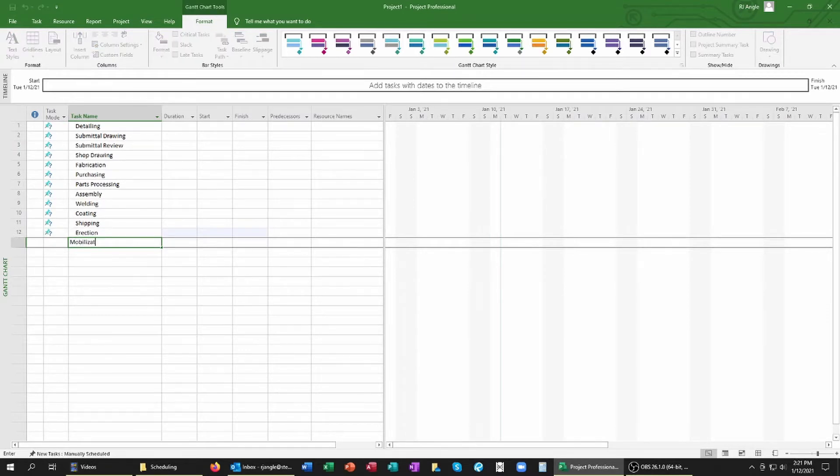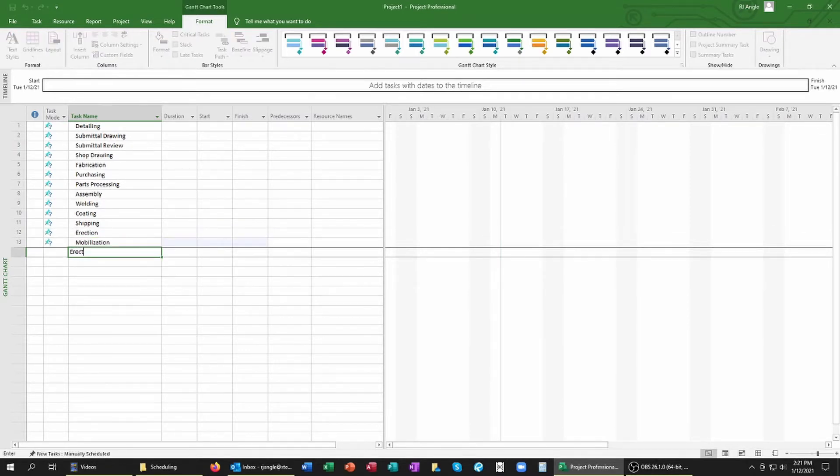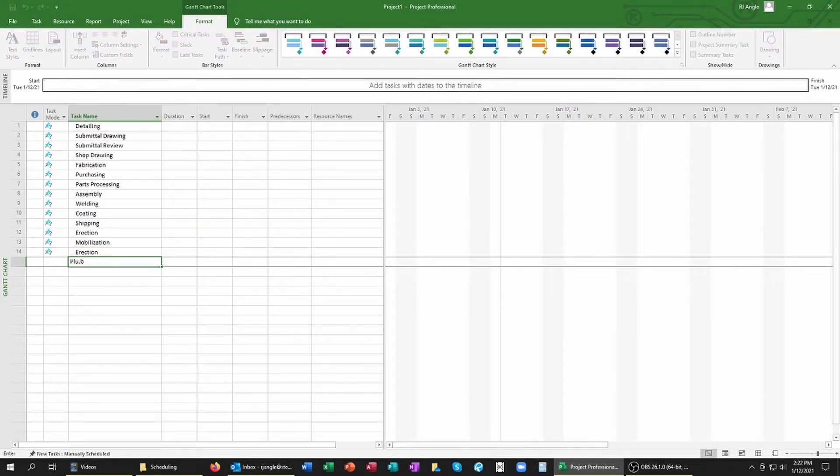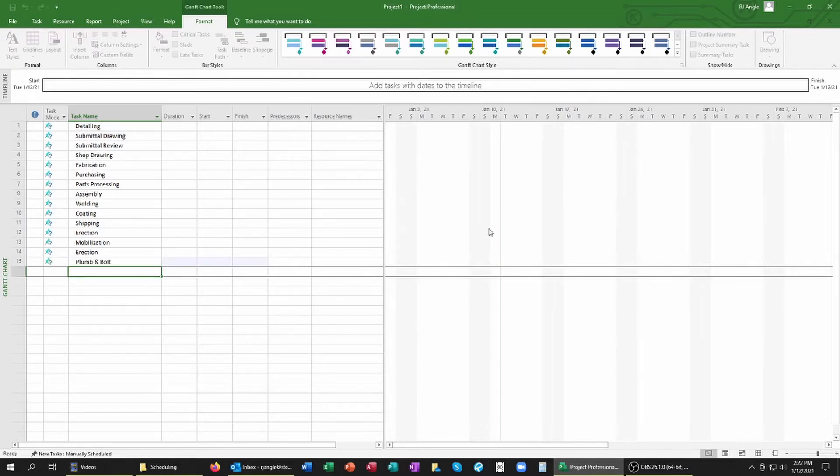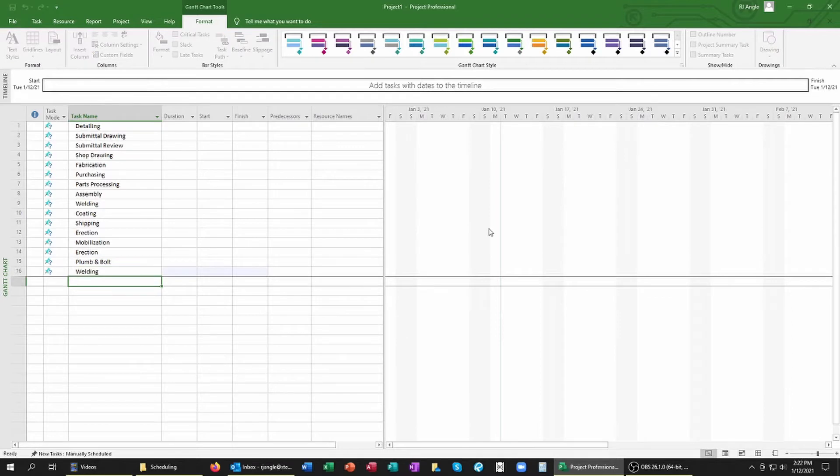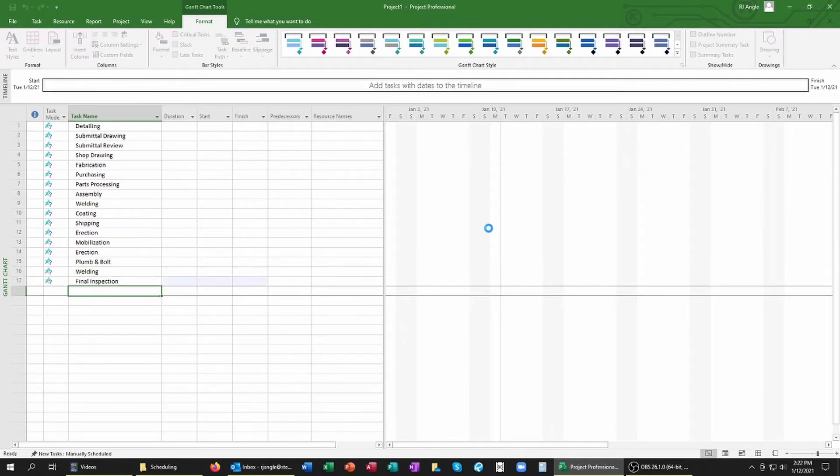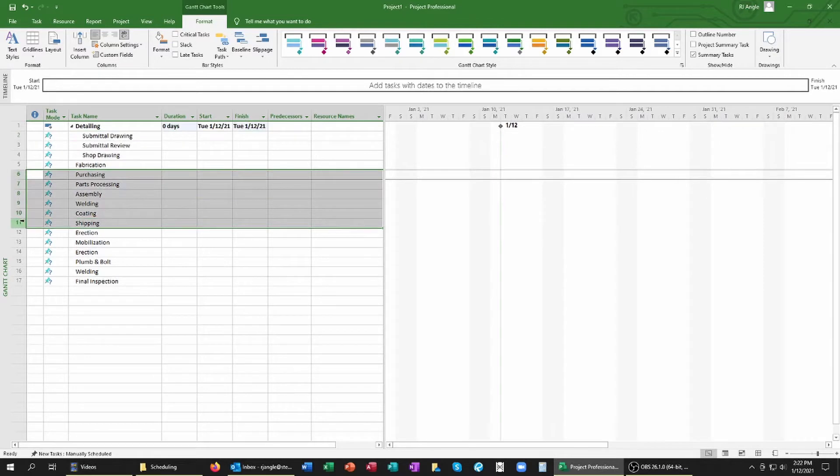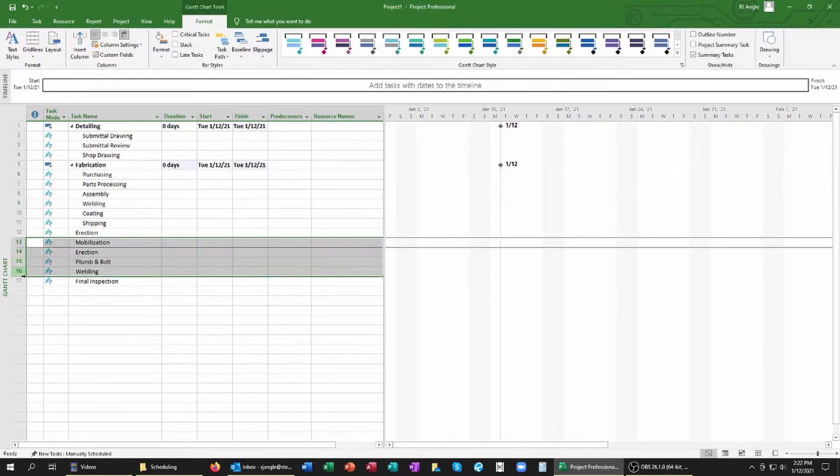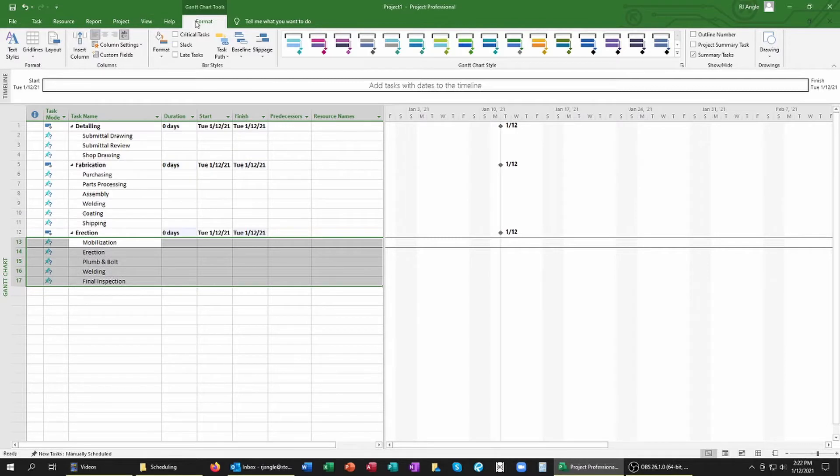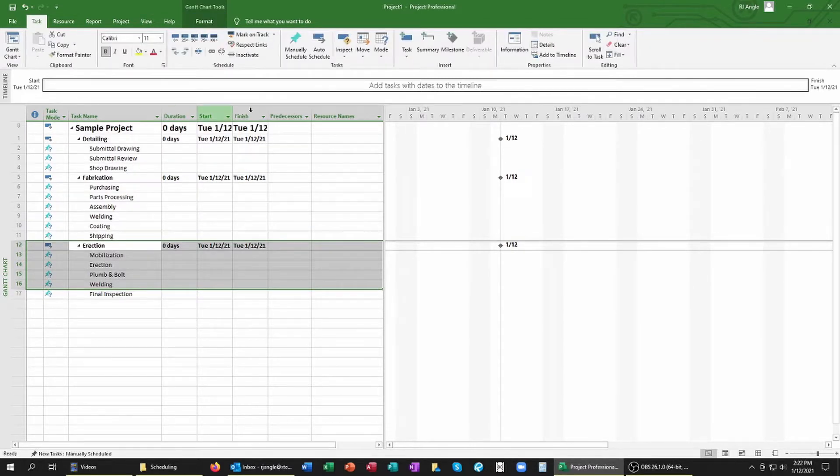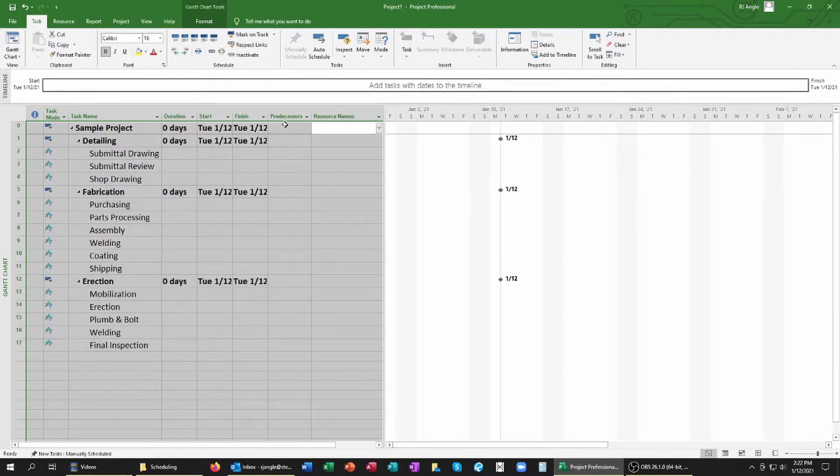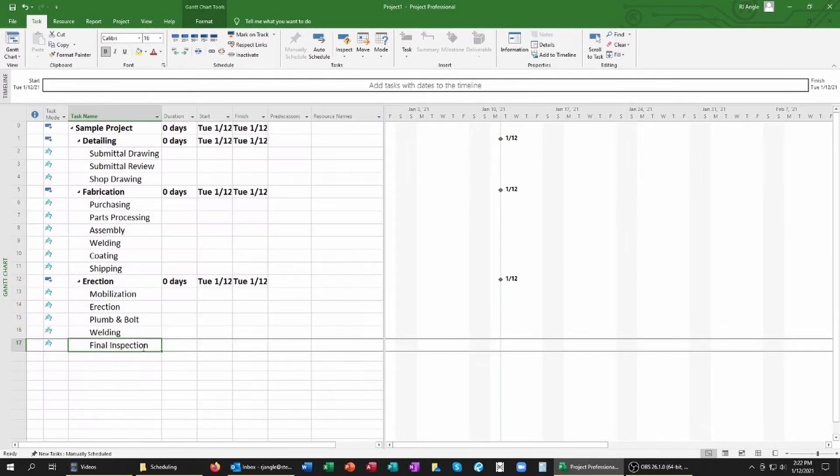Building a preliminary schedule is a lot like a brainstorming activity that you used to do in grade school. This isn't going to be your finished piece, but the objective here is to get all of your ideas on paper and we're going to organize them later in the coordination stage. The key to building any truly successful schedule is in the details. You should endeavor to identify and then itemize every single step and process in the development of your project. After performing the document review that we discussed last week, yourself and your team should know this project and your company well enough to determine what those steps are going to be. And those are going to change on every single job, depending on your scope of work and requirements. But I've built a generic project schedule for us to review today.